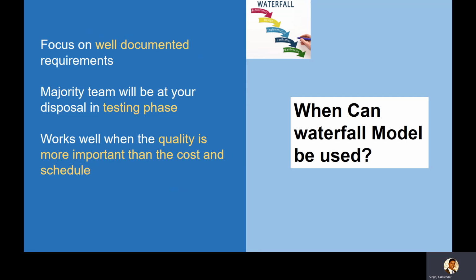When it comes to the testing phase, you have a lot of team available at your disposal to help you with the testing phase. Again, it can ramp up and impact the cost for retaining the team, but that happens. Most of the time, till production go-live, we keep some portion of each and every team, be it designers, requirements, business analysts, so they can help during the testing phase. So in the testing phase, a lot of resources are available to test and validate the product.